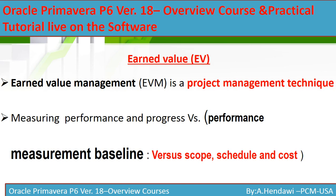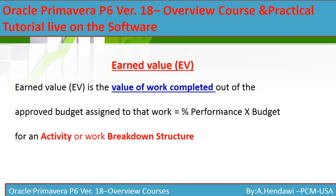Earned Value Management is a management technique that measures performance and progress versus the performance measurement baseline, which covers scope, schedule, and cost. Earned Value is the value of work completed — it is the approved budget assigned to the work completed. If you do this in Primavera or anywhere, you multiply the performance by the budget for an activity or work breakdown structure.